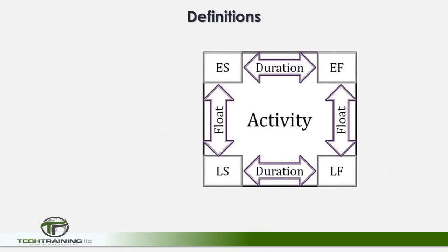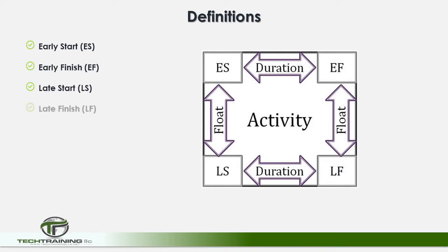Another extremely important aspect of proper scheduling is durations. A duration is the time it takes to complete a specific task. Once durations have been established, job calculations can begin. Job calculations are defined as ES, or early start, EF, or early finish, LS, late start, and LF, late finish. Once these items are calculated, we can calculate the total float, free float, and lag time is calculated later.